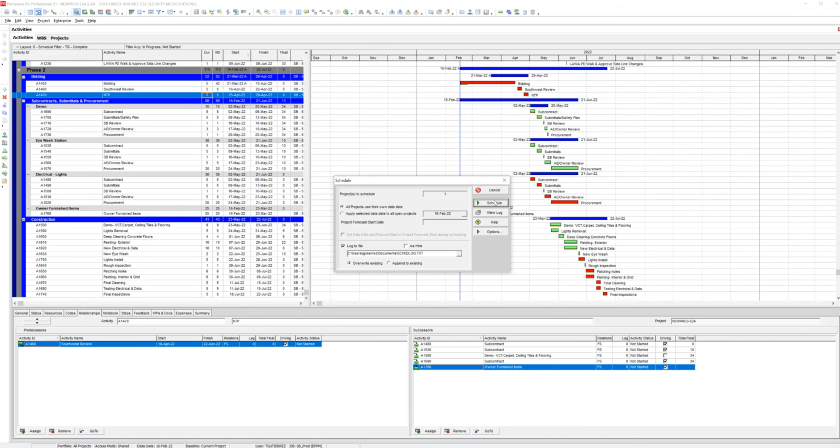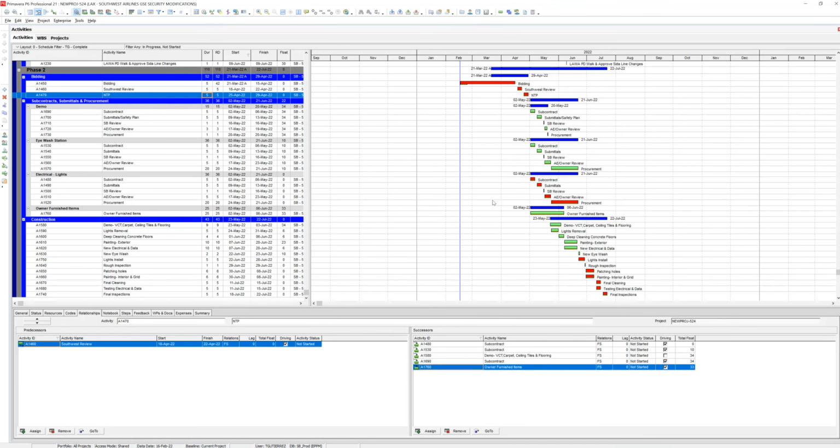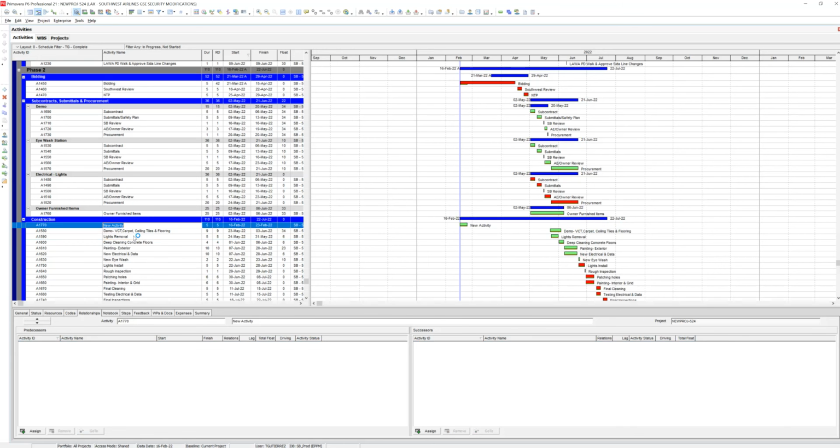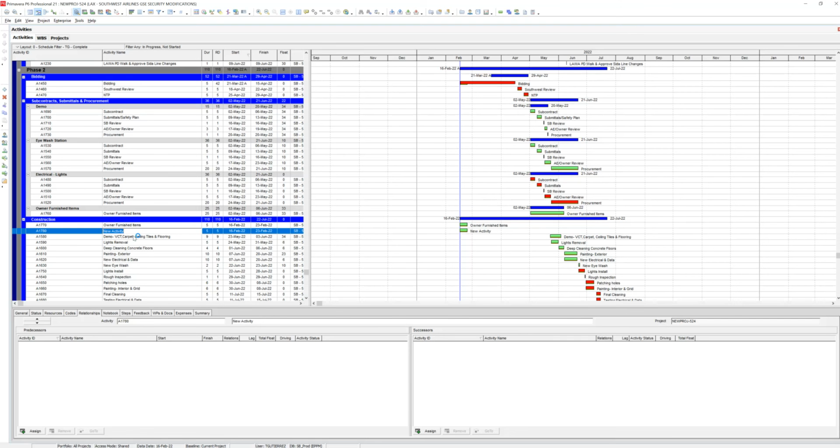And here's why it's important. You're going to need all his items in for your final inspection, right? Because you're going to have to hook them up, like clocks and stuff like that. So here in the construction, I'm going to add in owner furnished items. And I'm adding an activity for MEP to owner furnished items, because you're going to have to hook up electrical, maybe a water line to a fridge or something. MEP to owner furnished items. Okay.